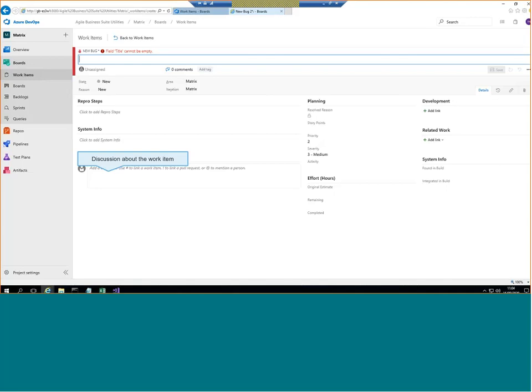And to me, that's one of the most powerful features: in 6 months' time, I can go back and look at why we reached this conclusion and what we did. We can also record how much work we actually needed to fix the problem in real terms, so we can get more accurate estimates, such as this particular type of bug took us X hours to fix. And we can record the actual development history of what's going on with it.